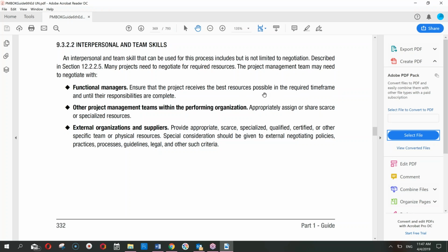You see, if you ask human resource department to supply you certain number of people, what they will do is they will send the least experienced people, because they know that projects are high demanding and the people who work on projects, they get experience, their competence is enhanced, they learn a lot there. Therefore, their best option is to send in non-experienced people, whereas we can't afford it. In project, we want the job done in the best way, and therefore we have to ensure, do not leave ever on the HR manager or the functional manager to select for you.